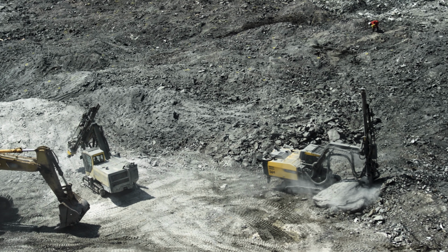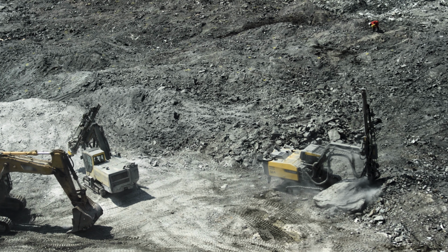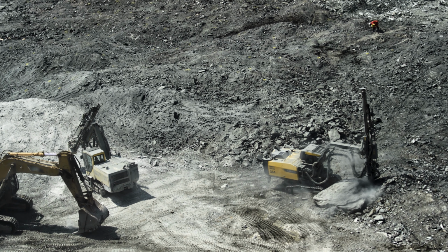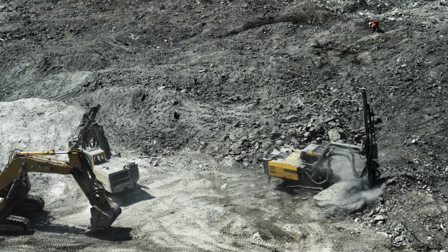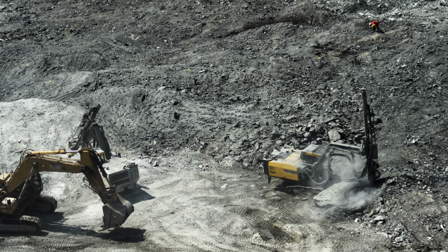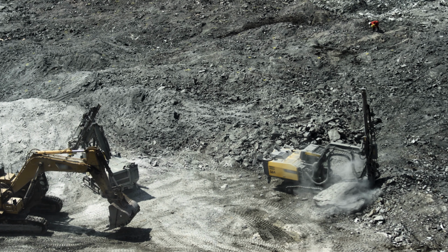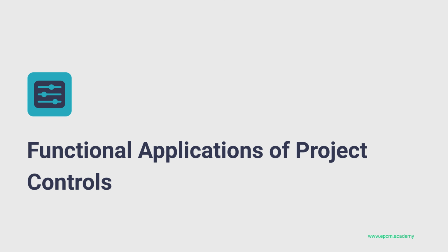I see. And I'm guessing that remote location plays a big role in shaping that strategy. You got it. The document mentions that they're considering incorporating modular construction and prefabrication, building components off-site and then transporting them to the location. They can minimize the amount of work that needs to be done in that challenging environment. That's a smart way to adapt to the circumstances. It's like bringing the factory to the project site, rather than trying to build everything from scratch in the middle of nowhere. Exactly. It's all about finding ways to mitigate those risks and challenges associated with the remote location.